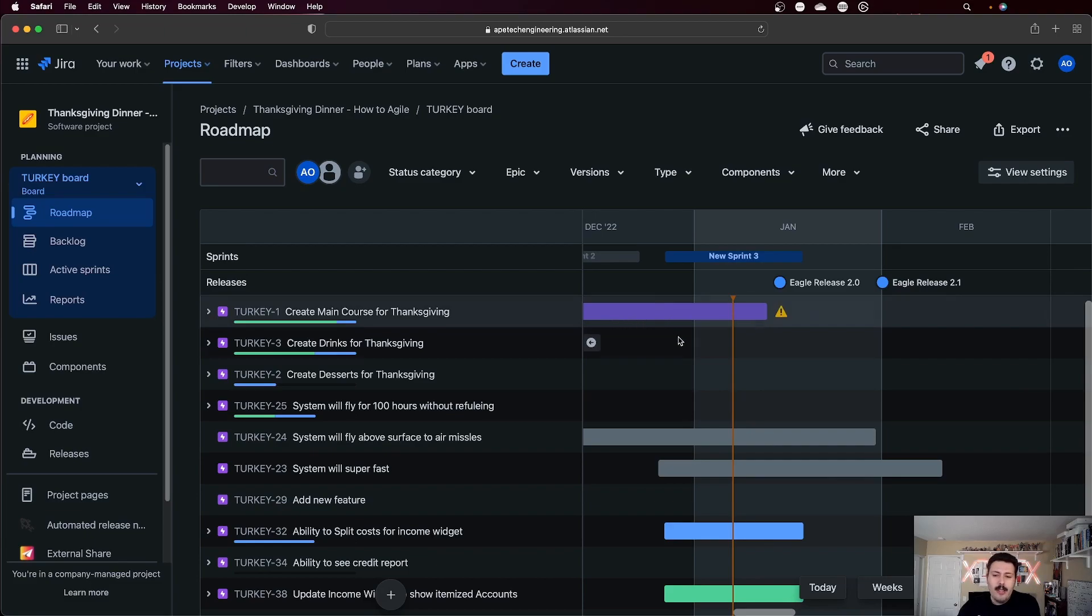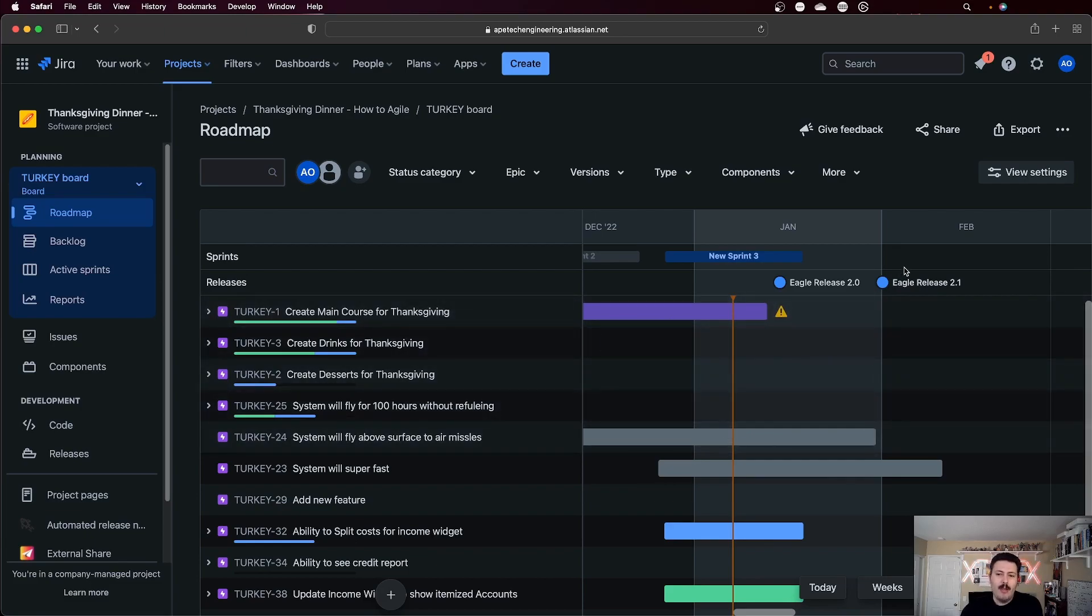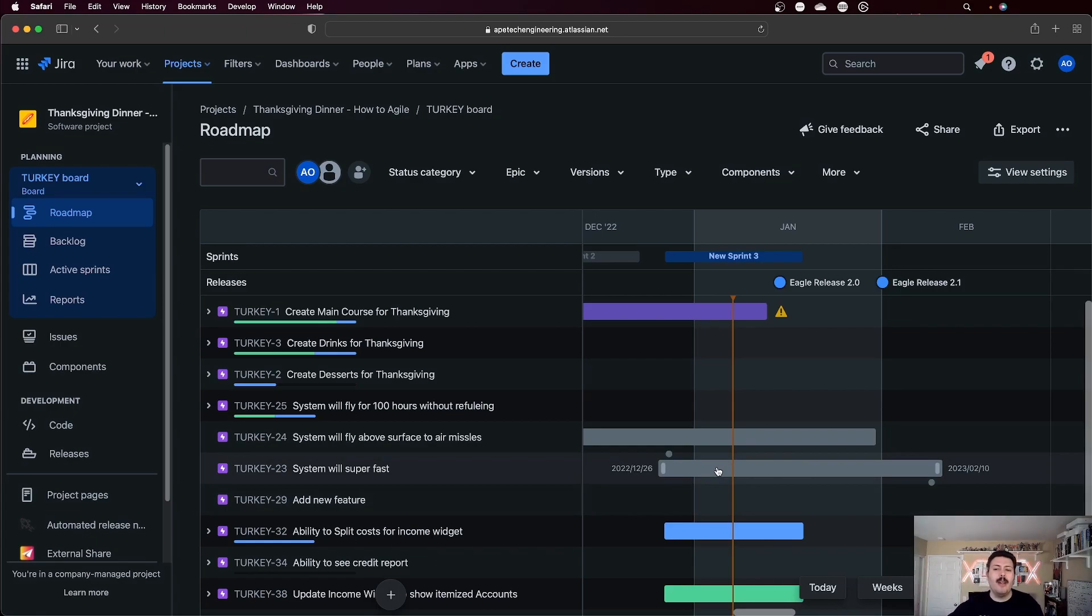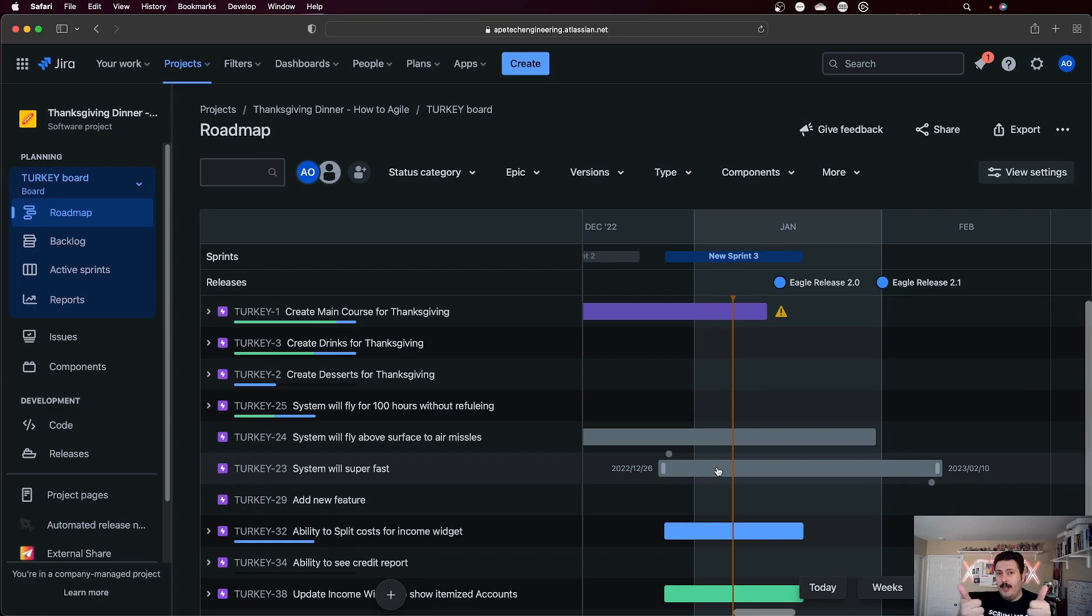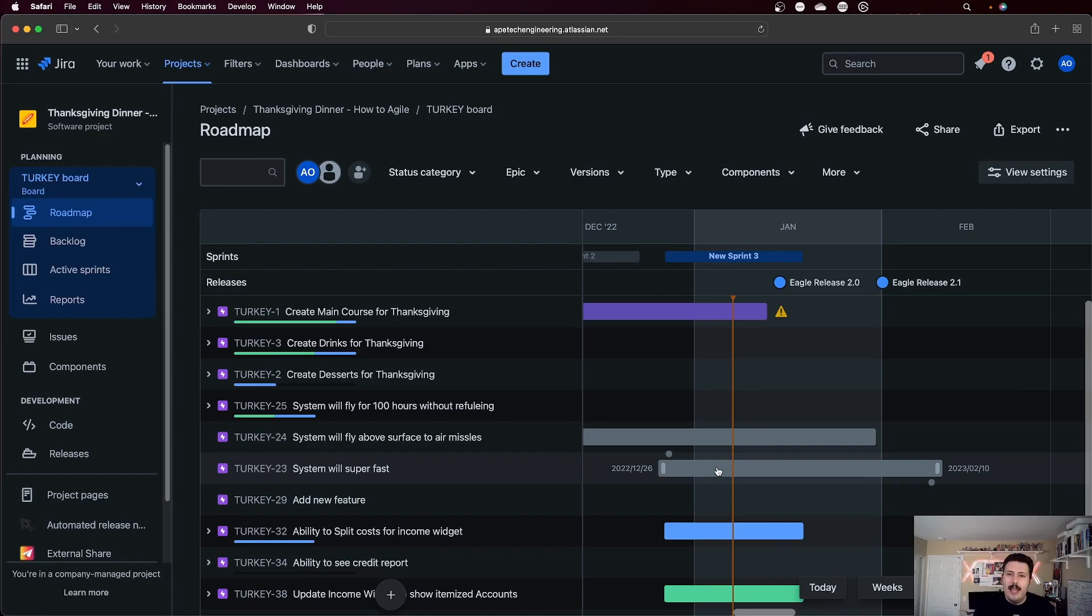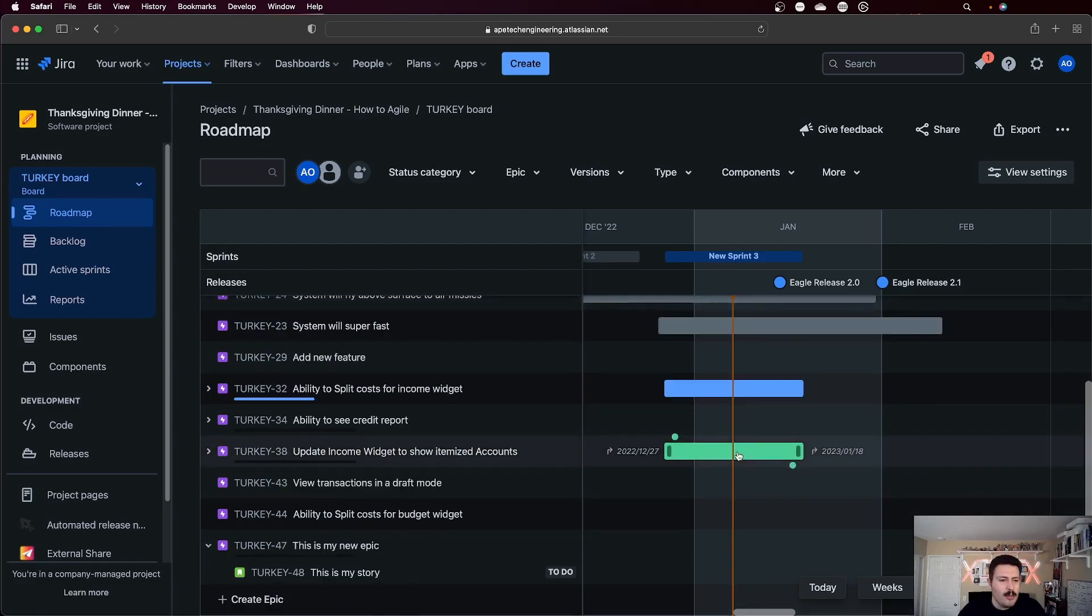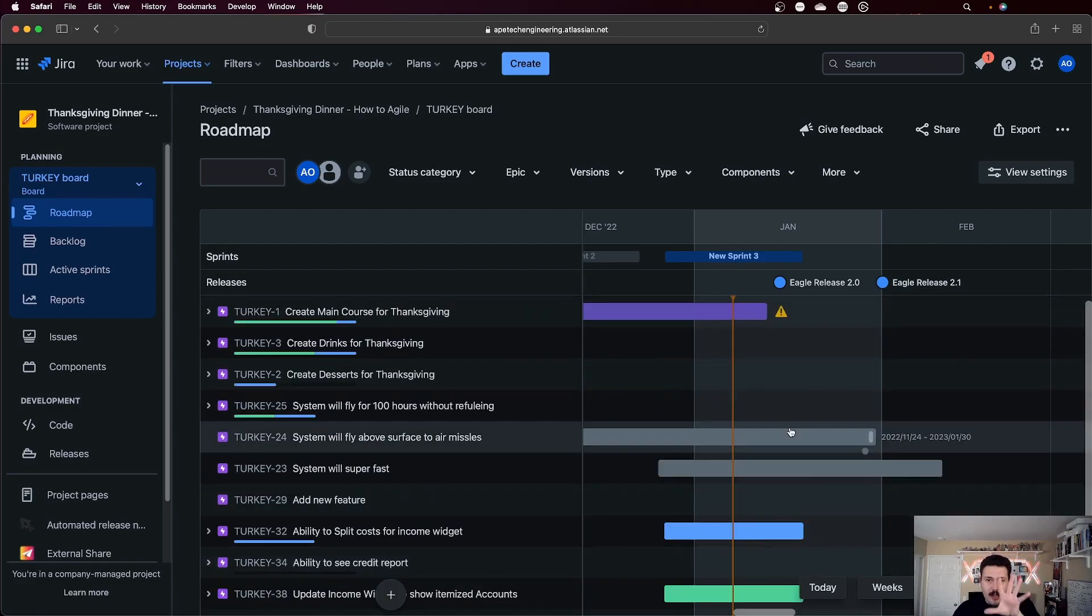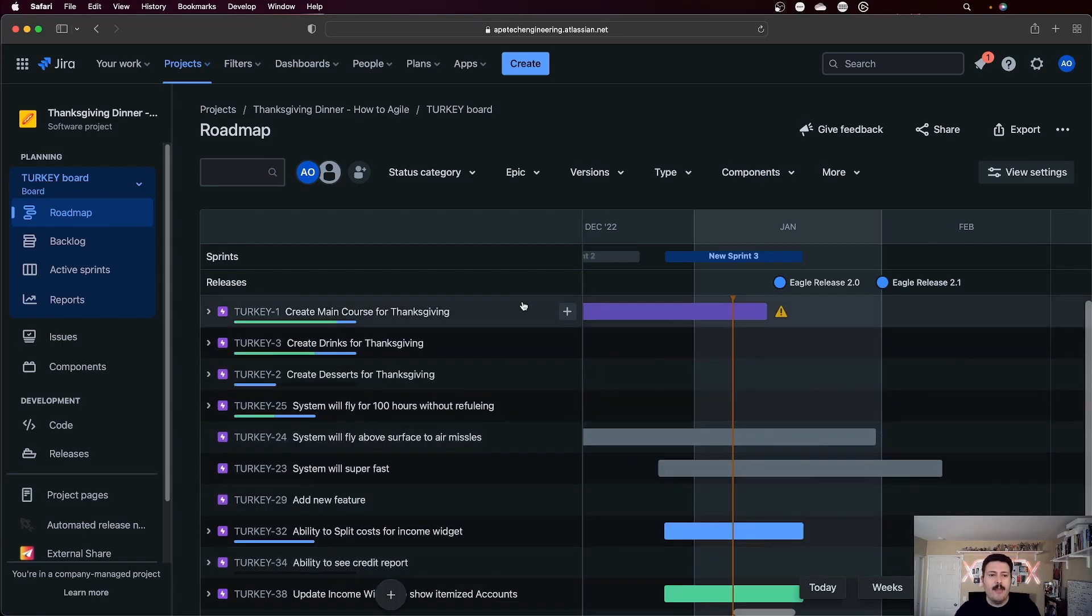Then you can visualize those a lot easier on here so that you can see and understand, oh, well, all these epics are going to be good because they happened before the release. But now this epic here, we have a problem because it's going to be concluded after the fact. It's going to be concluded after we ship the release. And if that is your intention, if that feature doesn't belong to that release, kudos. But if it's not, if that feature or that epic is supposed to be in your release, then Houston, we have a little bit of a problem. Now you got to go negotiate and figure out how to pull that schedule to the left. So that's really all the cool stuff that you can do just at face value.